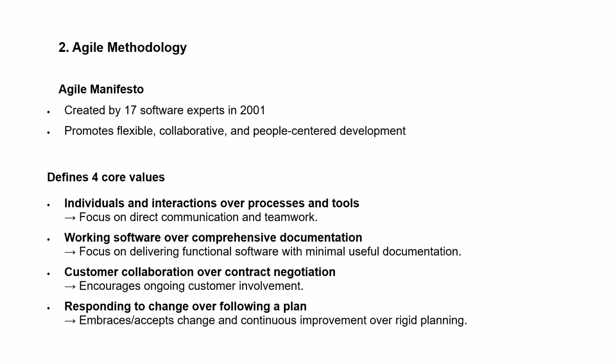We develop something, show the customer what we developed, get comments and feedback, and go to the next iteration, etc. So Agile focuses on building the software in iterations, for example a month or 2 weeks each. I will talk more about this when I talk about Scrum.